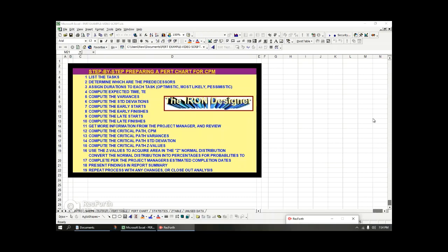As you know, nowadays we have issues with supply chain and things, so that's something that you're going to be considering at this point. All of this is just basically a model, and your model has to be flexible enough to change and take in consideration changes as things go down from start to end. The next thing is computing the critical path. So once you've done all the steps above, you can begin to create a sketch, which is your PERT chart. And in the PERT chart, you can view the critical path items.